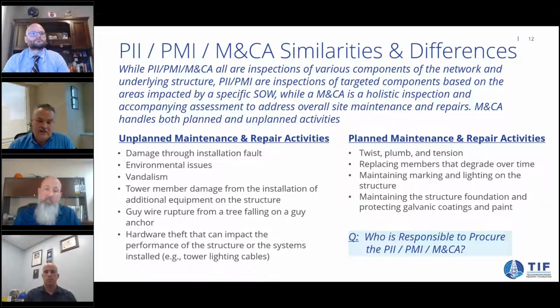So the question is, who's responsible to procure these three types of inspections? Typically the PMI and the PII are going to be facilitated by our EORs in conjunction with the end users and potentially the tower owners. And then traditionally, the maintenance condition assessments are going to lie with the structure owners themselves.